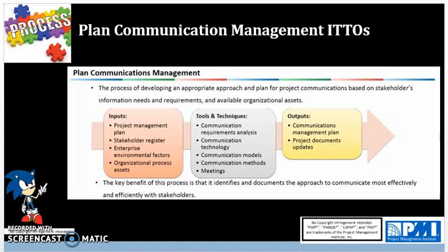Methods basically: you have the interactive method using meetings, phone calls, instant messaging, video conferencing. Then you have the push communication method, where information is distributed but doesn't ensure it actually reached who it was intended for or was understood. So basically letters, memos, press releases, emails, voicemails, faxes, and reports. So as a project manager, you might email everybody on the team, but you don't assume that everyone has read it unless you have a read receipt, but even then you can't force them to read the email if they don't have buy-in.